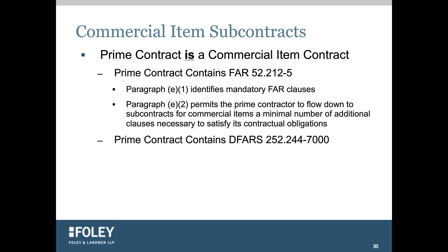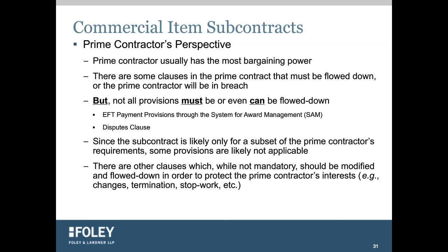There are some clauses, though, that don't apply to subs at all. Marshall talked about the disputes clause that actually doesn't apply to subcontractors. The Claims Process, Contract Disputes Act, doesn't apply to subs. So if that's the only disputes clause you have in your contract, you don't really have a disputes clause.